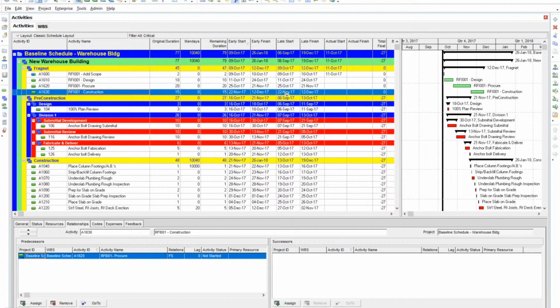Now, based on the schedule update, we got 69 days, right? But we also had a concurrent delay of 27, which means that we had 27 days, they had 27 days. Our 27 days is because we're behind on productivity. Their 27 days is based on the added scope. Well, that becomes a wash, okay? At the end of the day, we kind of have to throw that out.